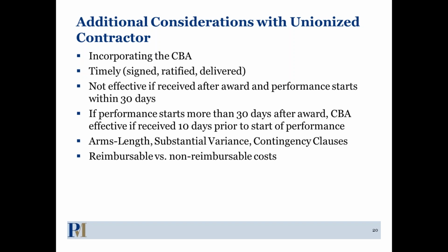Other things to remember are that the regulations require an arm's length negotiation. You can't just kind of come up with exorbitant rates and expect that the government will automatically accept those. It has to be bona fide negotiations. They cannot be at substantial variance with the previous wages. So if you have a $20 increase in wage rates, likelihood is that that's going to raise someone's eyebrows and they're going to come back and say, no, that's too much of a variance from the previous wage determination.